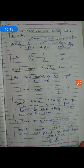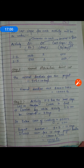Step 2: Normal duration direct cost. The normal duration of the project is 9 + 5 = 14 days. The normal direct cost is 8,000 + 5,000 = 13,000 rupees. These are the normal duration and normal cost as per your network diagram without crashing. Step 3: Crash the activity along the critical path. Here we have 2 activities — 1-2 and 2-3 — so 1 to 3 is the critical path. It contains two activities: 1-2 and 2-3.